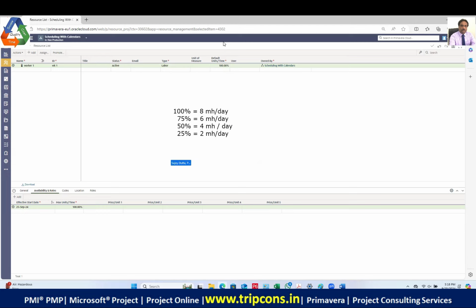So what I'm saying is that a full-time employee will be 100%. That is his capacity to work, so I can use him for the entire 8 hours of the day. Suppose the employee for whom I'm creating the record doesn't work full time in the company, he works only part time. Suppose he works 6 hours, so I'm going to enter 75% here. For 6 hours, the corresponding maximum units per time will be 75%.